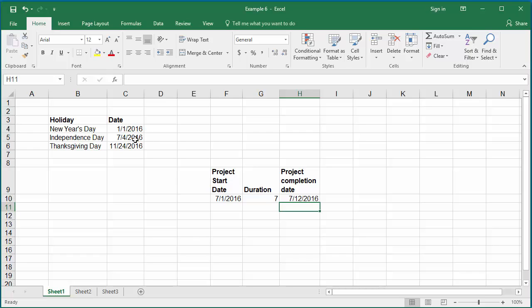Now to exclude holidays, change the formula to include the range of holidays to be excluded. Click on cell H10 again.